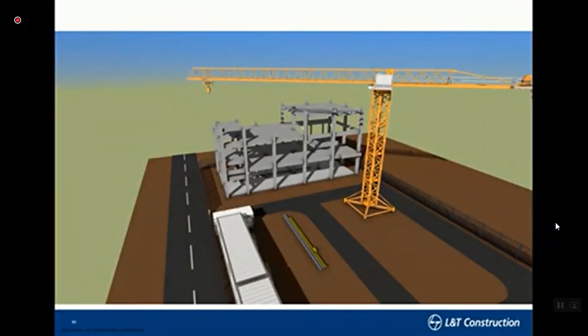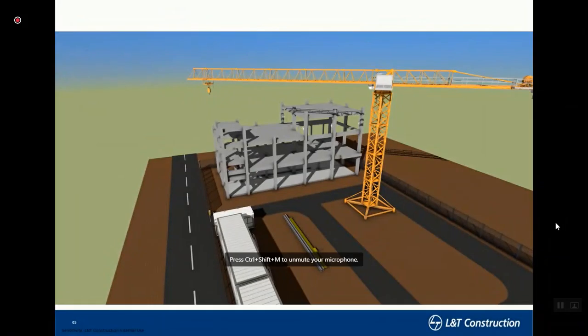Now, at this stage, before I go to the next video, what I am trying to do here is two, three things. One, digitally build it before actual construction. The second thing is, when we say 4D, we know what 3D is. 3D is what? Length, width, and height. The fourth dimension is when I am adding schedule or time. So if you go back to one of the slides, I showed the Gantt charts and the model. What actually is happening is the project planning team is coming into force here. The execution team is coming into the BIM process here.